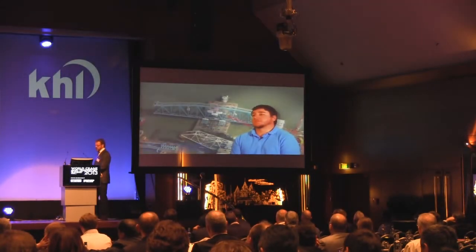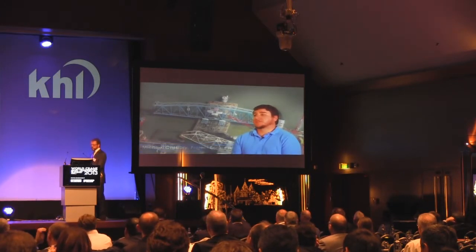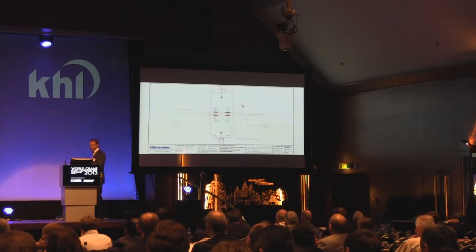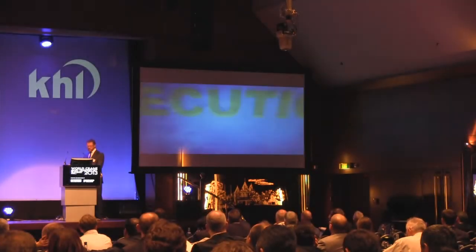In order to accurately control the bridge and precisely set it in place, we designed a 4-point mooring system. This system consisted of two double drum waterfall winches, one placed at the rear and one placed at the front of the barge. The two rear lines were used for propulsion and the two front lines were used for braking. The two rear lines were connected to existing dolphins on either side of the channel, and the two front lines were connected to existing structure on the south side. Once these mooring lines were in place, the tugboats went idle and the winches took total control.